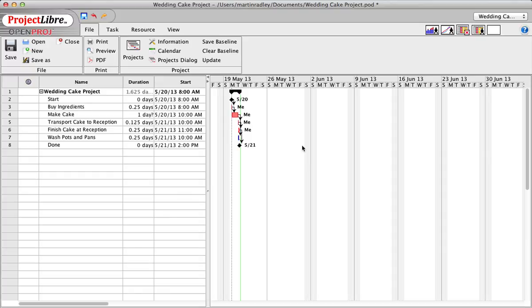And there were schedules that were submitted that said project X would be done in 6 months. But when I looked, resources were allocated sometimes 10,000 hours in a year, and of course there's only 2,000 working hours in a year.